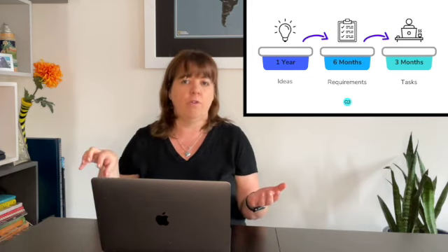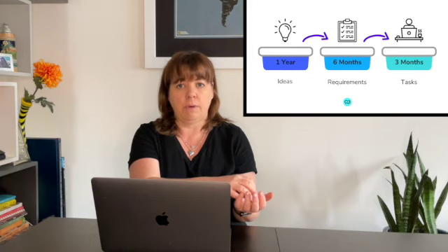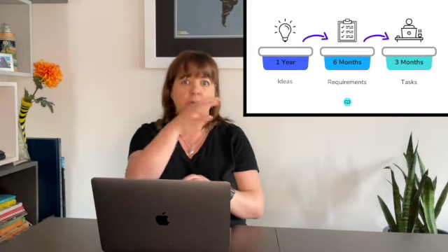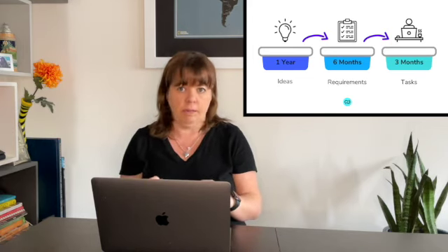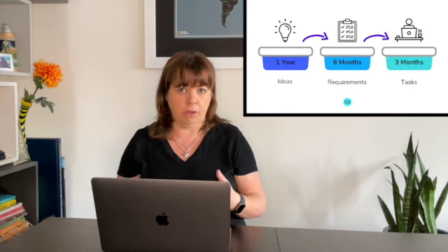So following the 6-month bucket, we have a 3-month bucket, which is where the actual work is going to take place for the delivery of the activities or the product. In this bucket, again, we're going to limit our work in progress, and things are only going to be requested to be moved over to the 3-month bucket once we know that there's bandwidth. So it is still that look back and request something move in. So similar to the way that that occurred with Kanban.